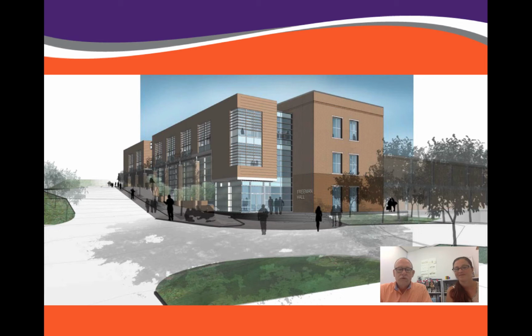We have some renderings, early renderings of the project. This project was on a very tight site in what could almost be considered an urban site. We have city blocks, stop signs, bus stops, high density buildings next to each other in a very, very active area of campus. It's a corner structure. For those of you who may not know the campus very well, it's the corner of Fernald Street and South Palmetto Boulevard. It is a slope site, as the renderings can show you, which added, as we will discuss later on, to the complexity of doing the work.